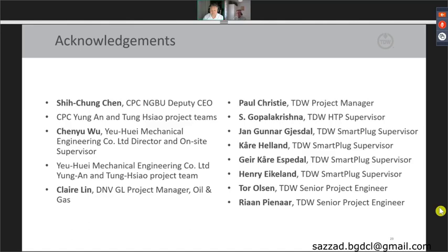The next question is from Mr. Muhammad Tanwar Hussain. What are the most critical parts in this operation? I think for the operation which was shown in the case study there, the critical part was the upfront engineering, because of the initial assessment of what isolation method we were going to use, and in this case we had to combine isolation methods. All of the engineering work was done up front, because we had a very tight window to carry out the operation. So we needed to ensure that every angle had been covered long before we got to site. And that was reflected in what went on site, which was a relatively smooth operation, and certainly within the time constraints of the shutdown.